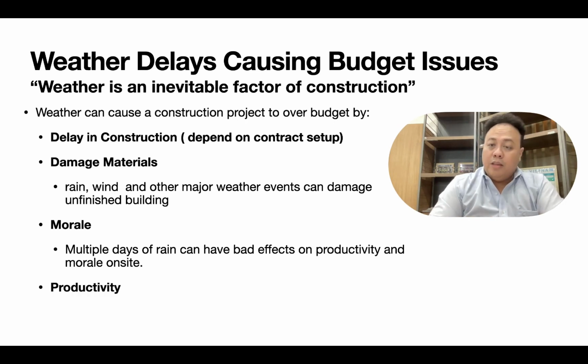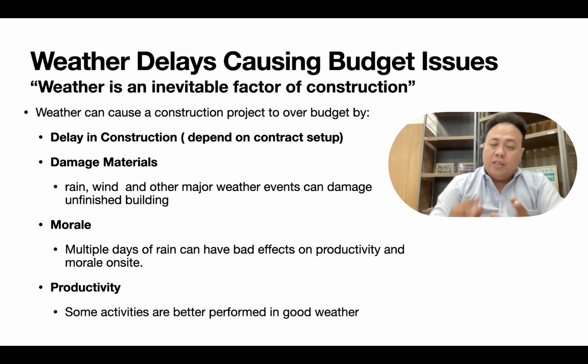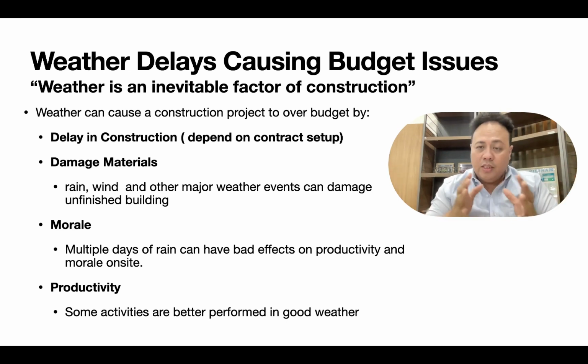Productivity, as I mentioned: some activities are better performed in good weather. When you make a schedule, you should understand what activities you should be doing, matching with the whole season of your project timeline. So, weather delays causing budget issues. What can you do?